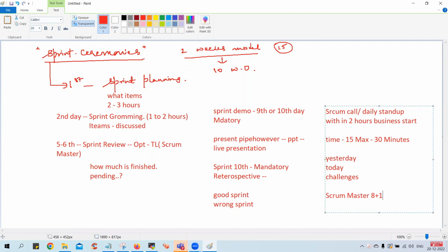So total 9. But if you observe in India, what is happening is some kind of drawback. You'll find a scrum master handling 20 people also. You find a scrum master handling 12, 15, 16, 14, right? According to the management size, a scrum master should handle only 8+1. The scrum master role is like a team lead, a facilitator who manages your sprint. Because you should have somebody to manage your sprint, guys. Technically, the scrum master will be the person who has good knowledge of the technology.